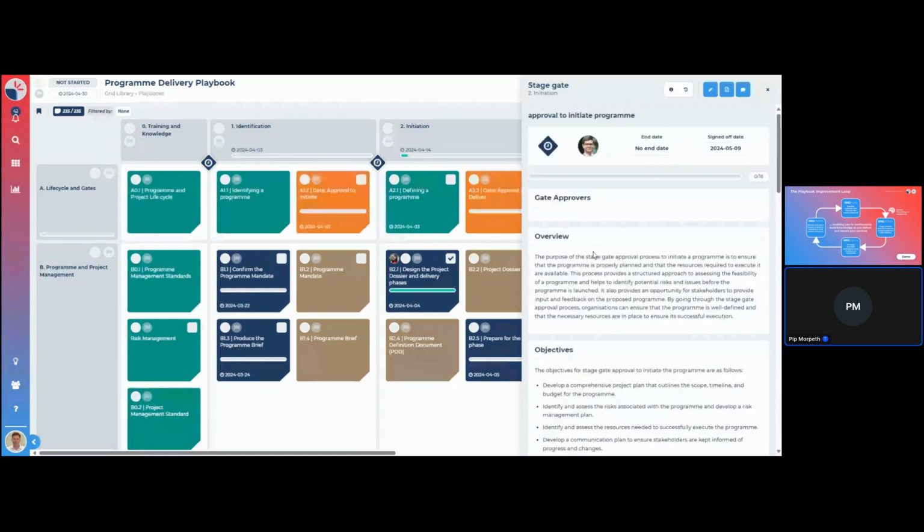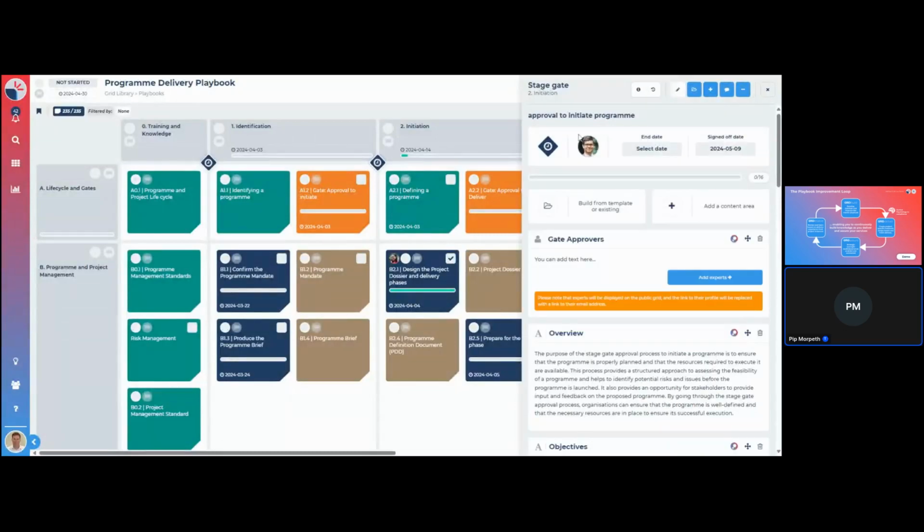It came up today, I was doing another demo, and one of the common questions we get asked is, how rigid is the platform? What we decided to do when it came to gates was, if you're in delivery, yes, you can say a gate's failed, you can say passed, but most outcomes we find with gates are a conditional pass. You haven't got everything that we need, but we've made a risk-based assessment. It's okay to continue, but please can you capture the work in progress? And then when we come to the next gate, we want to be able to pass the gate with no outstanding conditions. So it gives you that degree of flexibility to record those types of outcomes.